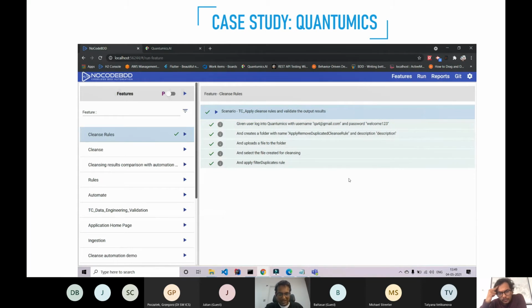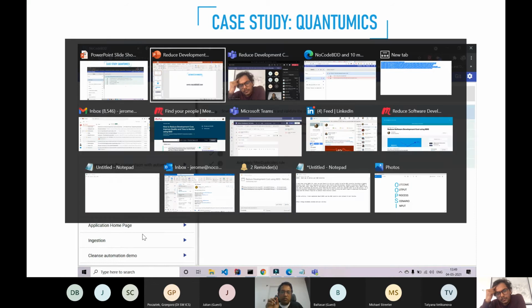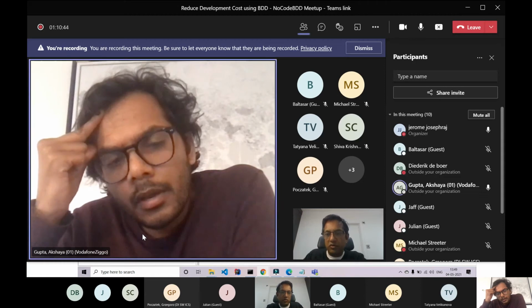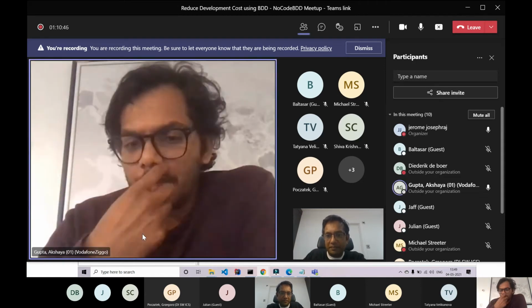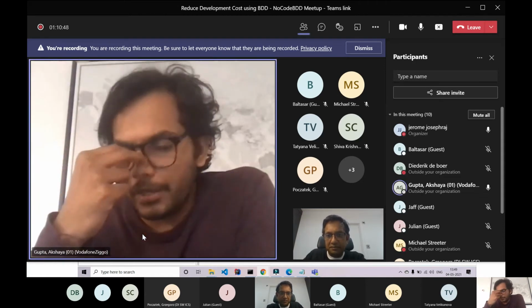What you would do is, in this case, prefix the cleanse rules with the Jira ID of the user story. So let's say, for argument's sake, the Jira ID is Jira 001 for the cleanse rule user story. This cleanse rule will be prefixed with Jira 001, so you exactly know which BDD feature belongs to which story. That's how you do the mapping. That's how you maintain it.